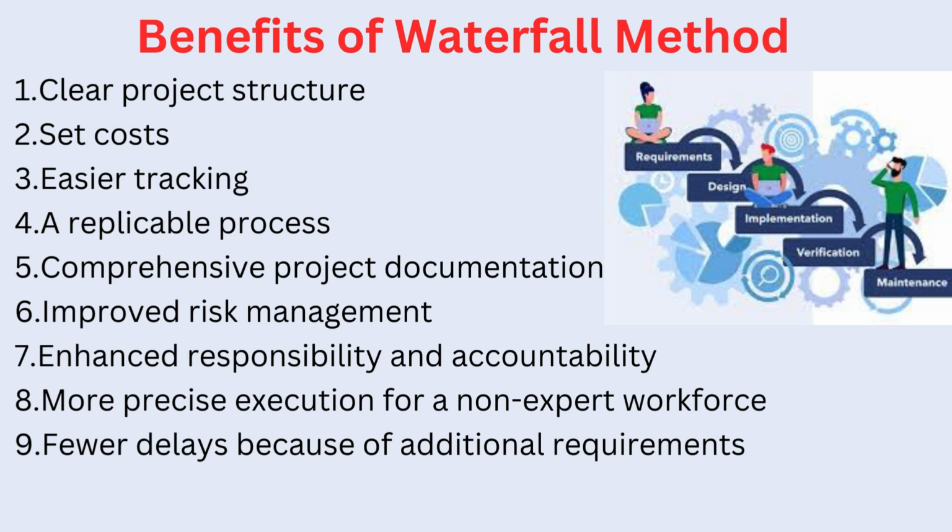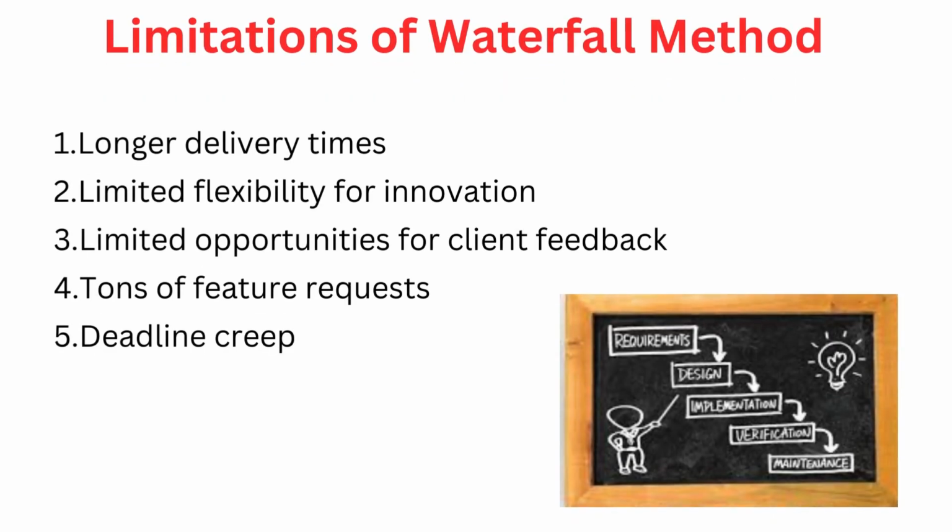Finally, the method allows fewer delays because additional requirement changes are discouraged if not captured at the requirement stage. Therefore, there are no last minute requirement changes happening. Customers are also mindful not to request them, since it will result in a fresh requirements estimation and a revised delivery date, usually later than the original one. So those are the benefits of the waterfall method.